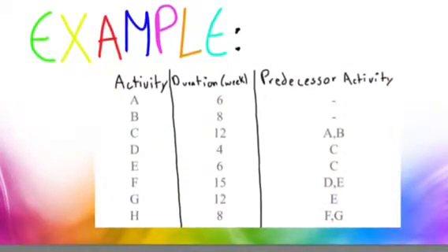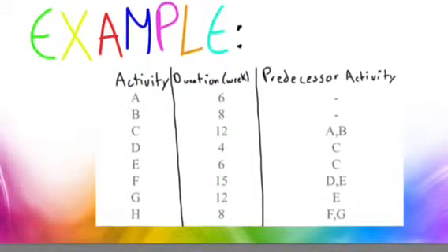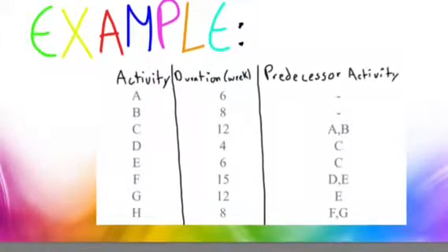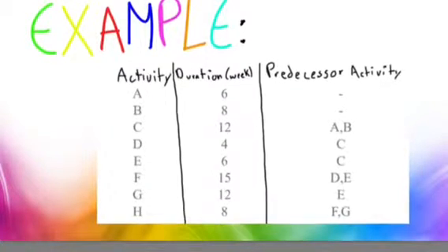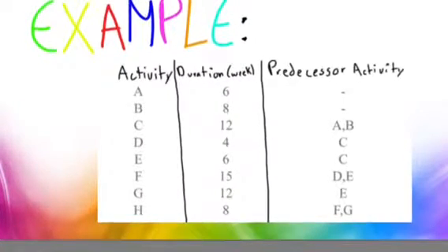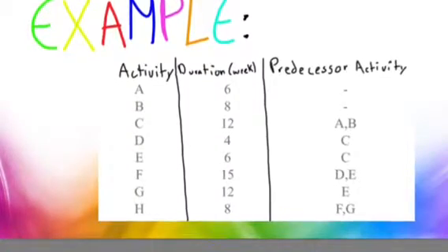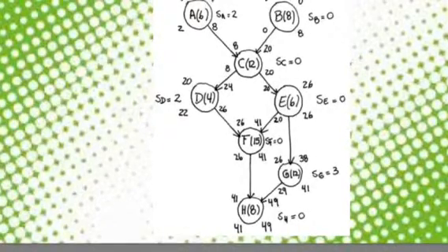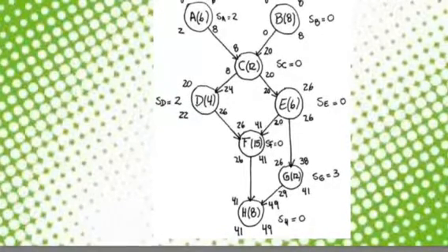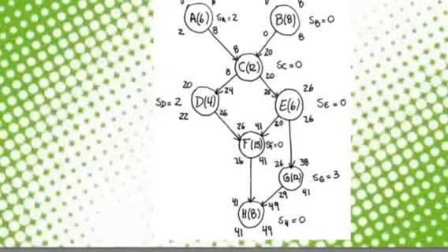Example: in the next chart, we have the necessary activities for completing a project. We can't change the length of each activity, and we are asked to determine the total length of the project by using the CPM. First, the diagram is constructed by identifying each activity in a circle with their respective name, and in parentheses the estimated time. The arrows between activities indicate relations. For example, activity F can only begin after completion of activities D and E.